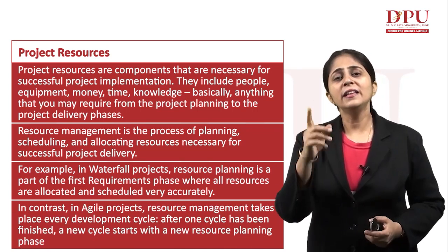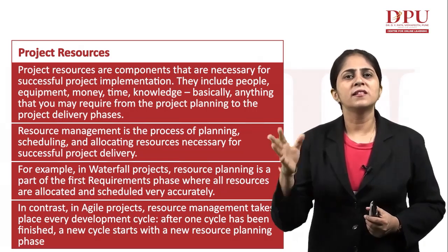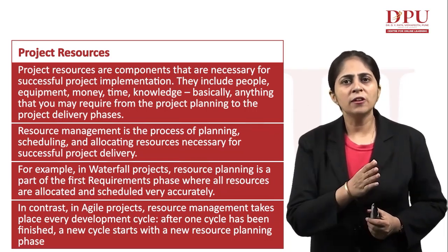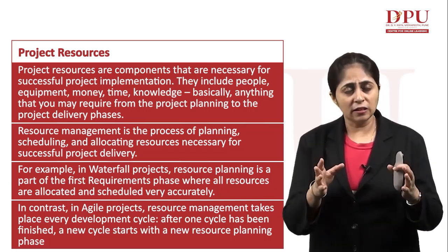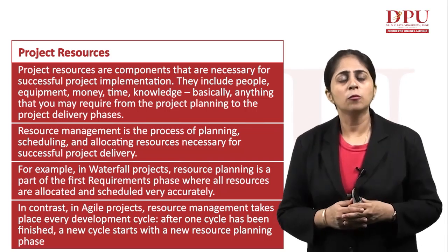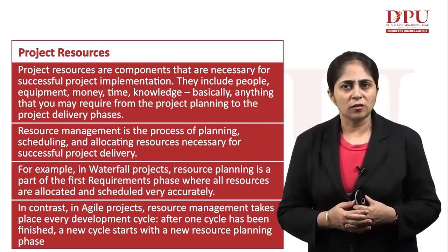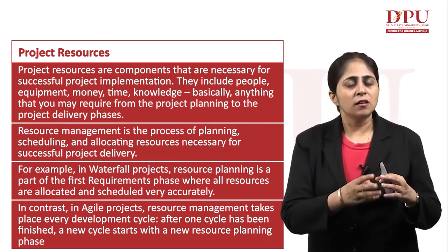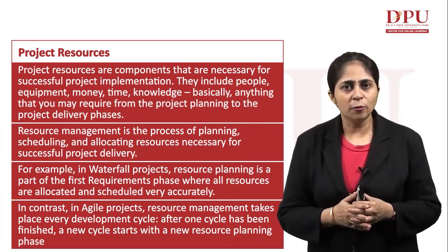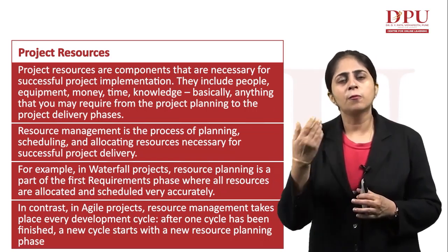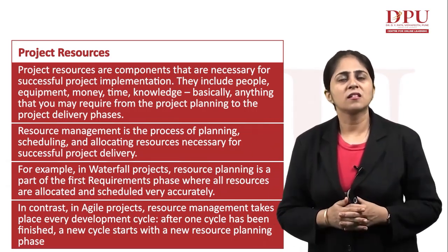In contrast, in agile projects, resource management takes place every development cycle. After one cycle has been finished, a new cycle starts with a new resource planning phase. That means in an agile methodology, we have different phases of building any BI project. So after every phase, the resource planning is done. Are we using the resources in the right way? Do we require any more resources for the completion of this phase? So after every phase, the resource planning task is done.